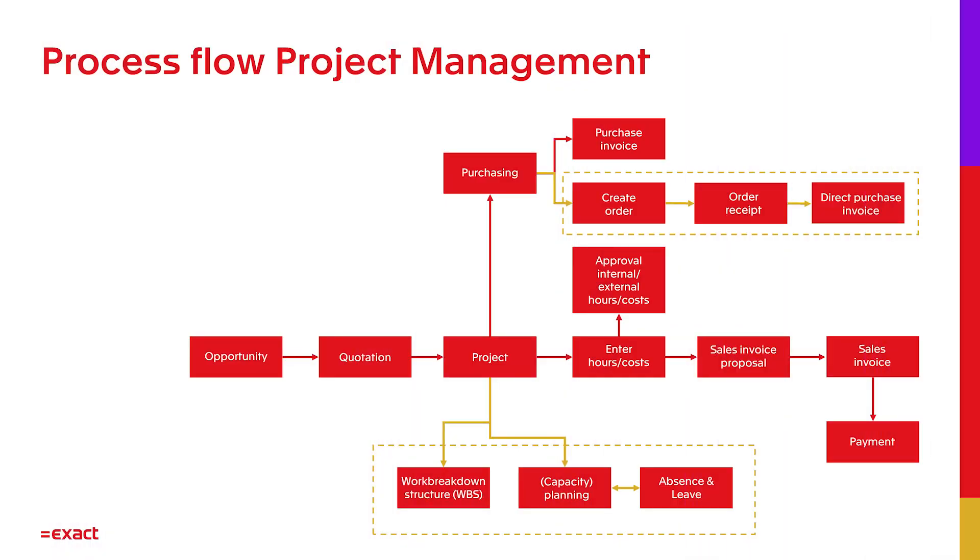If needed, they can be approved internally and externally. That means the timesheet can be sent to the customer so that they can approve this, which will lead to fewer questions when receiving an invoice, which will lead to quicker payments.